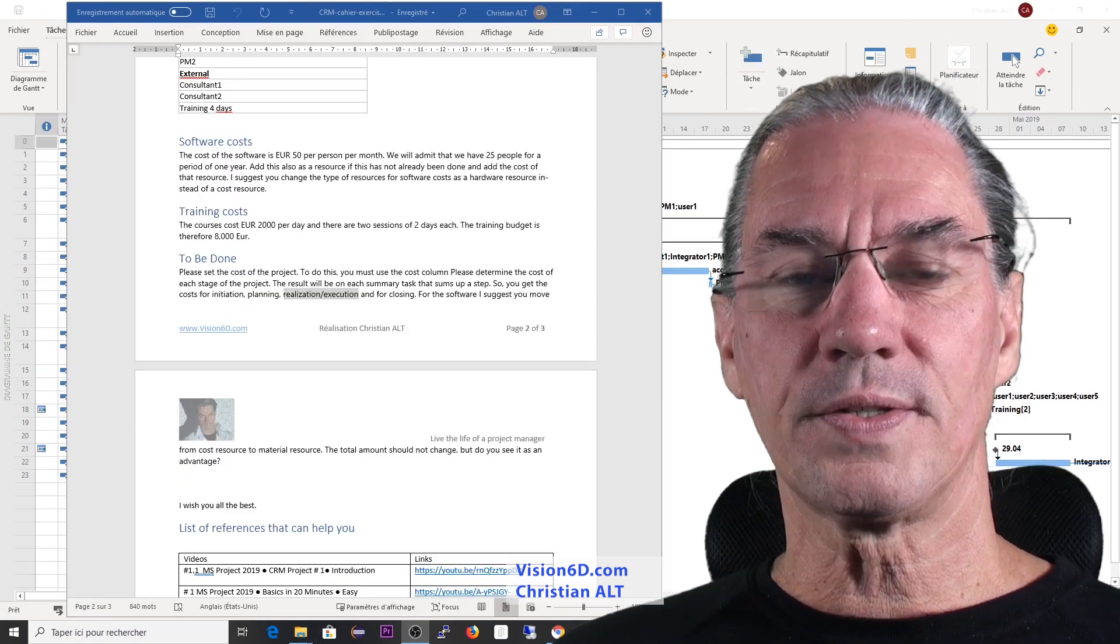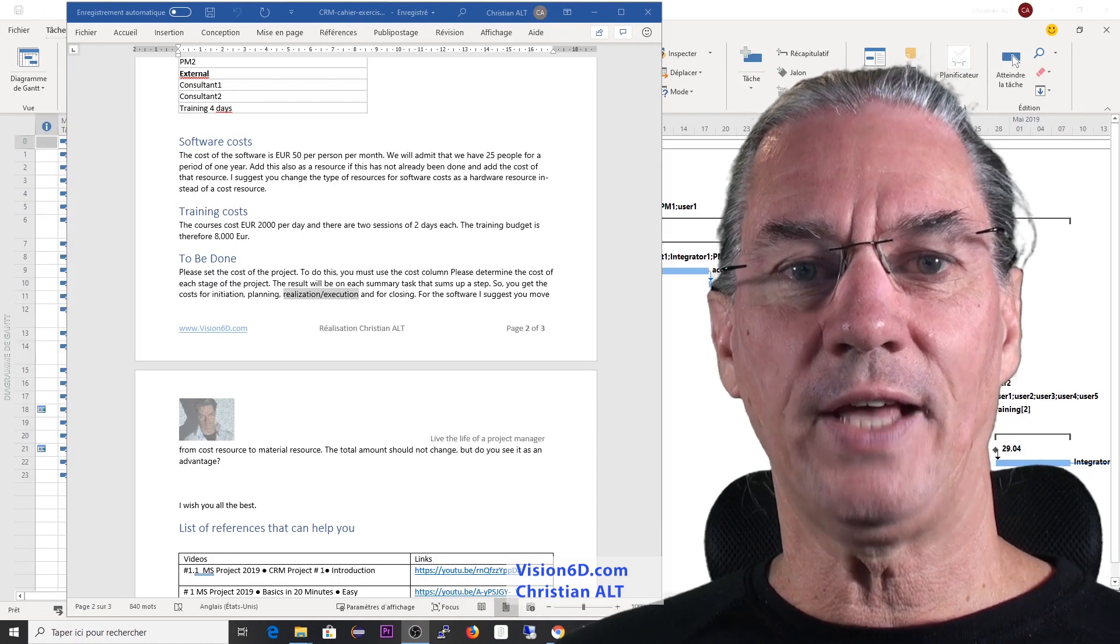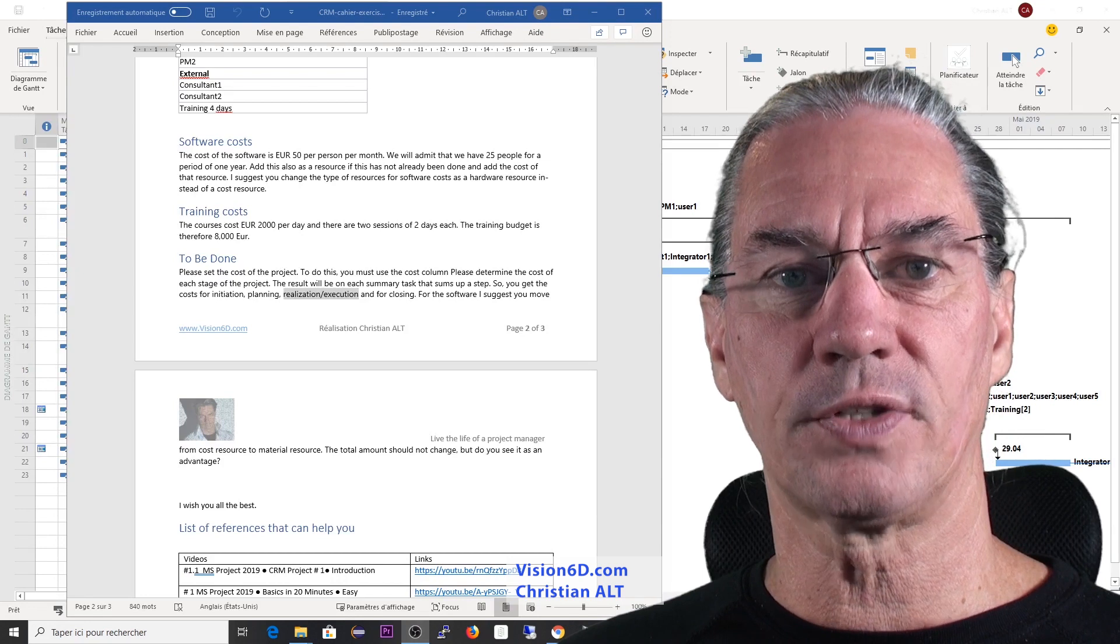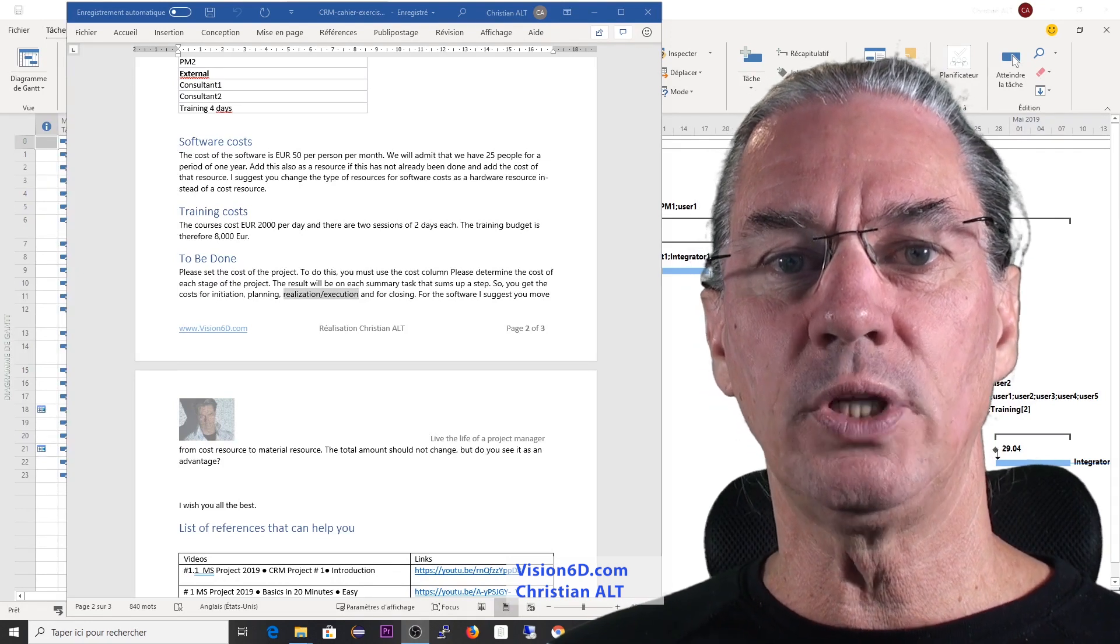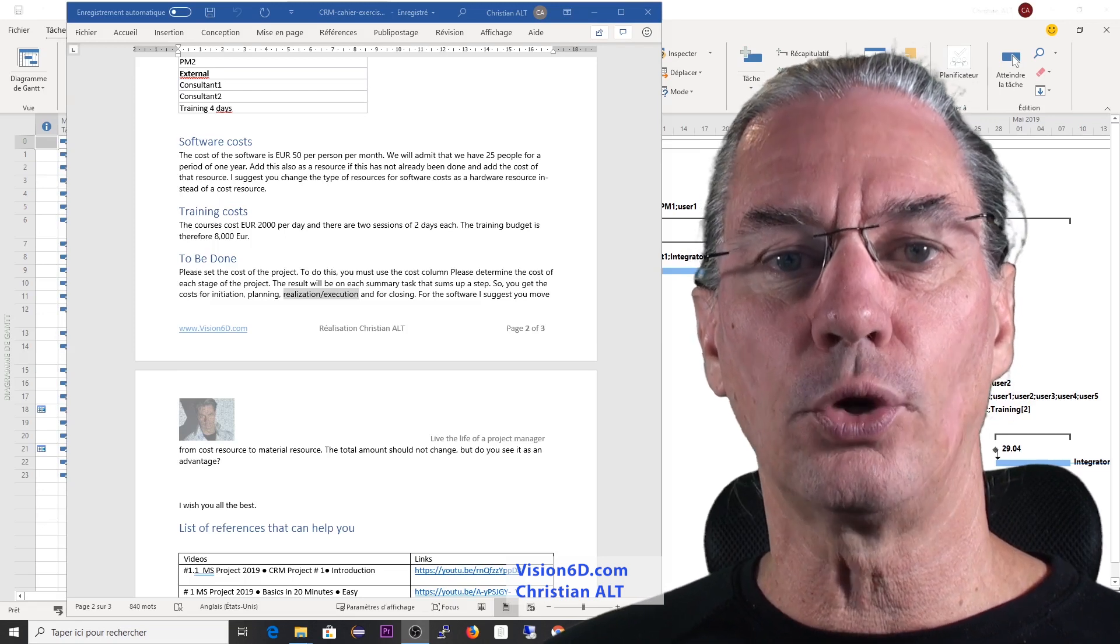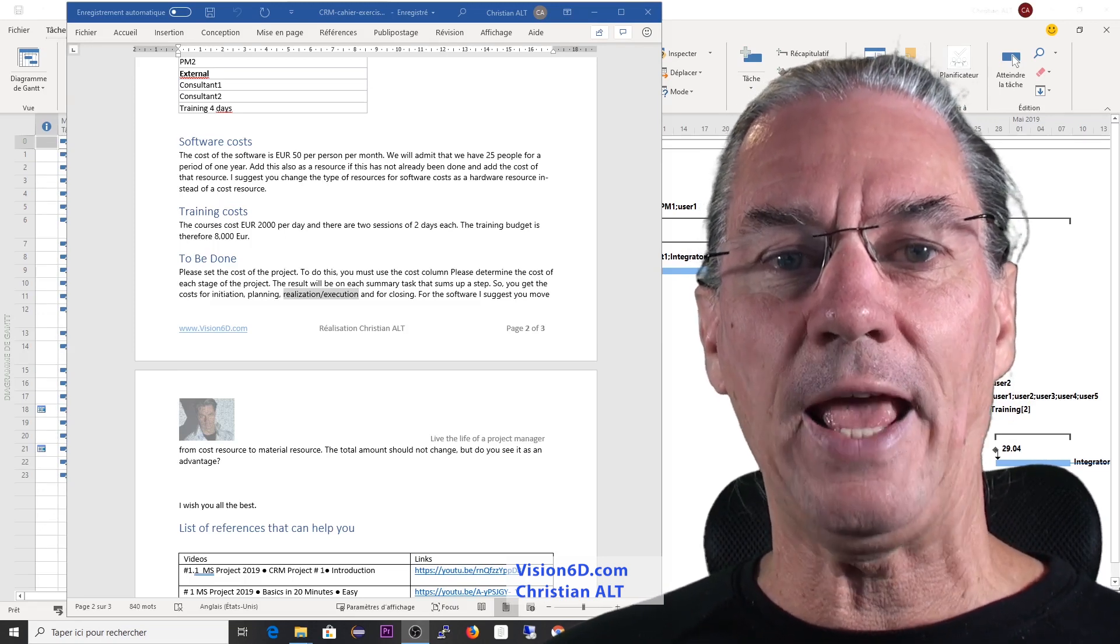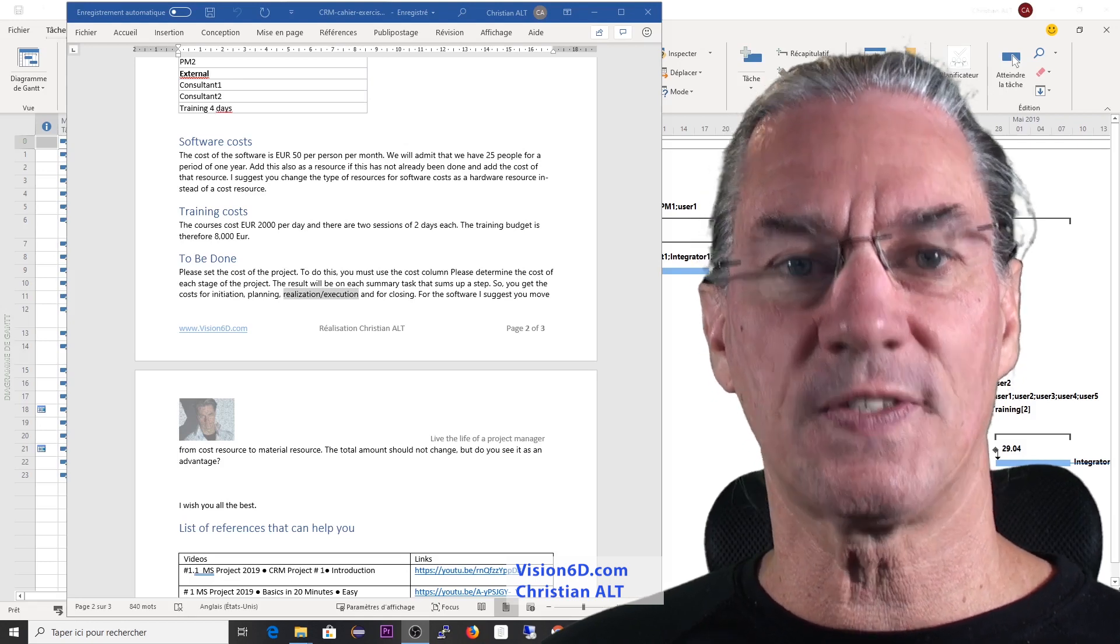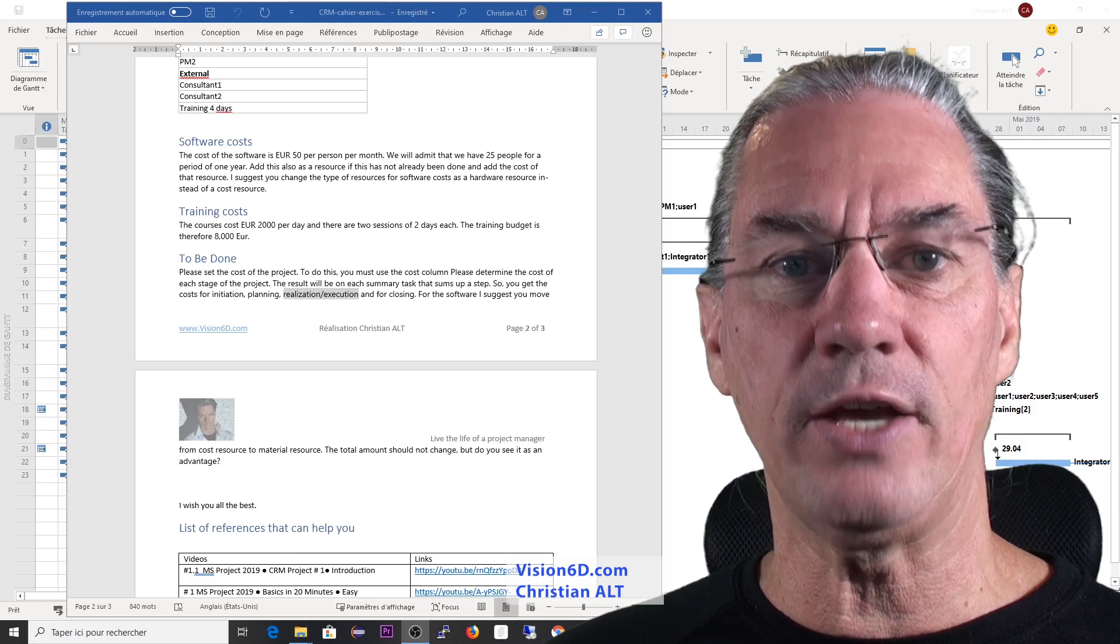Once the cost of each resource is defined, MS Project is going to calculate the cost for each task. And then we will see that summary tasks, they will also contain the total cost. With this, we will be able to have a number for each stage of this project,